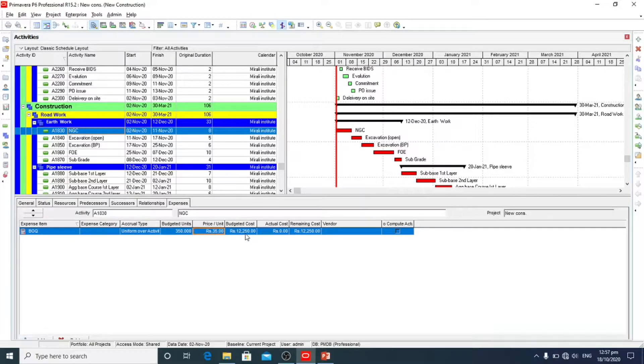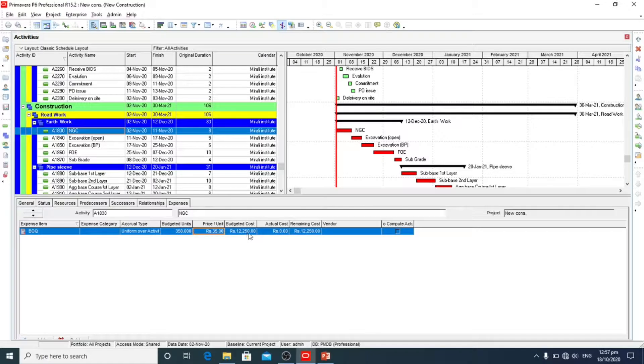So our budgeted cost for this activity is 12,250.